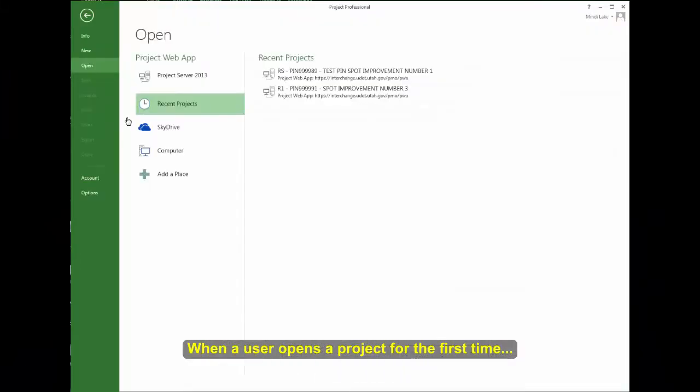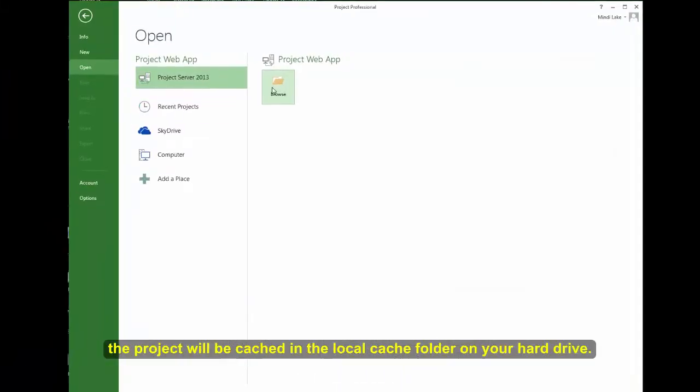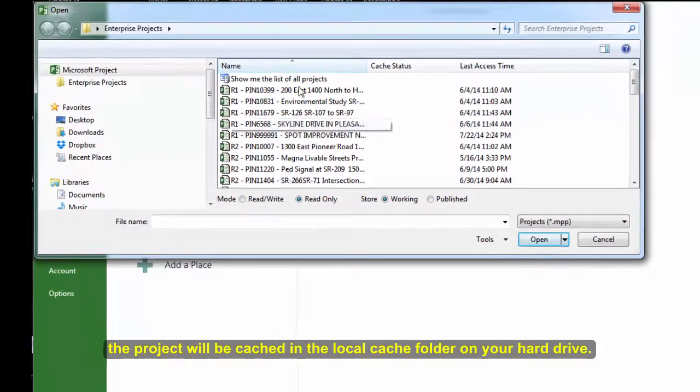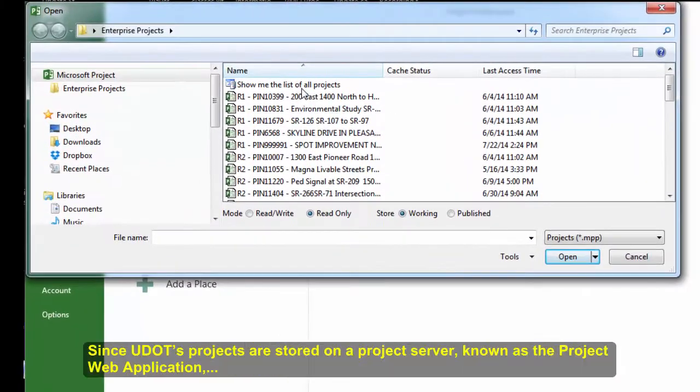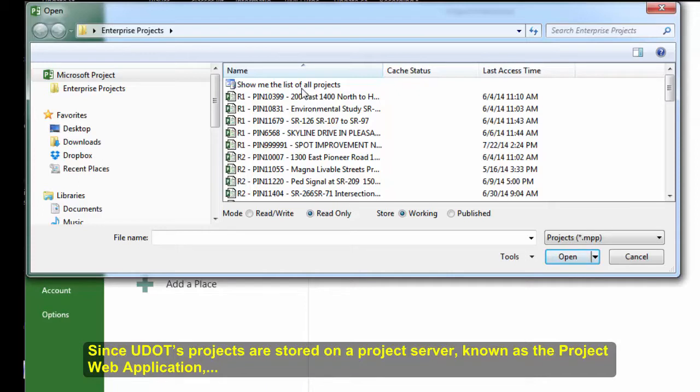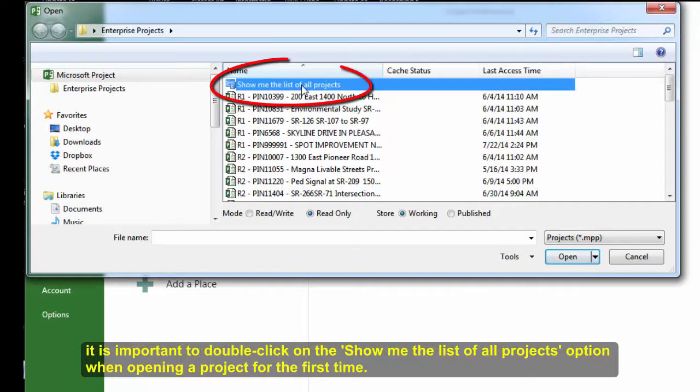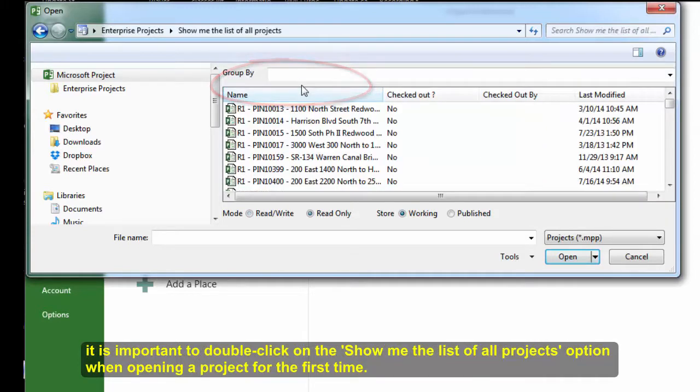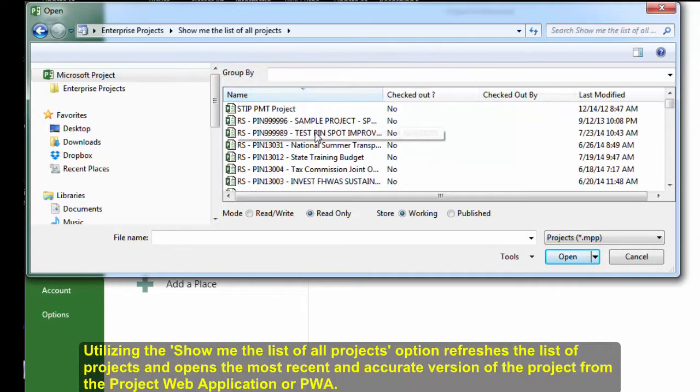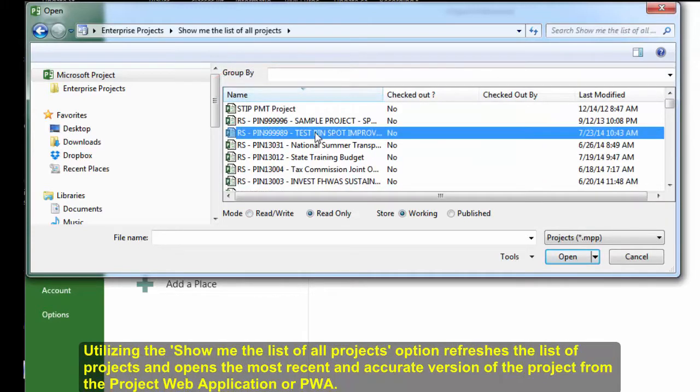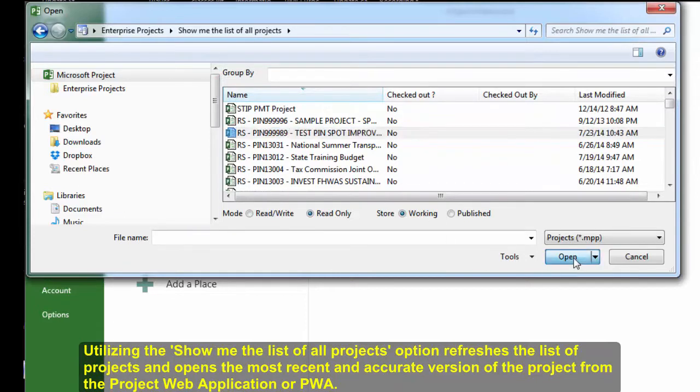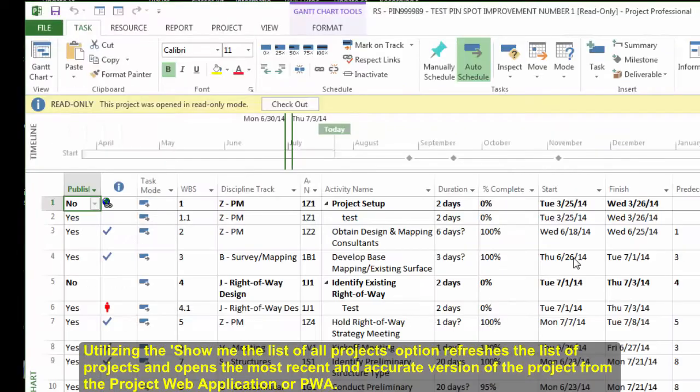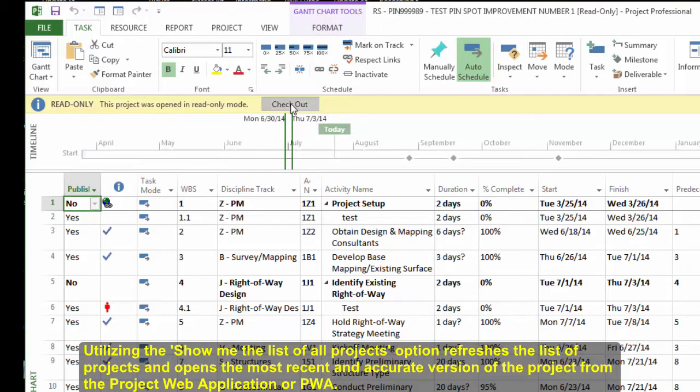When a user opens a project for the first time, the project will be cached in the local cache folder on your hard drive. Since UDOT's projects are stored on a project server, known as the Project Web Application, it is important to double-click on the Show Me the List of All Projects option when opening a project for the first time. Utilizing the Show Me the List of All Projects option refreshes the list of projects and opens the most recent and accurate version of the project from the Project Web Application.